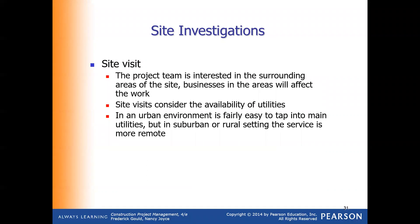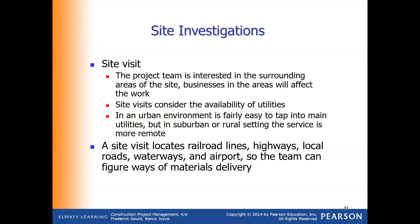If the project is in a downtown area, that's another scenario where you're going to have to block traffic and obtain permits and so forth. We also talked about utilities — if you are in an urban area, you can tie into existing, but you'll still have to obtain permits and pay fees to the city, state, or county. But if it's a rural area, then everything will be remote. For instance, do you need to rent temporary toilets, or is there an existing facility you can use? So those are the kinds of details that are deal-breakers and they can change the project cost, so we have to be careful.